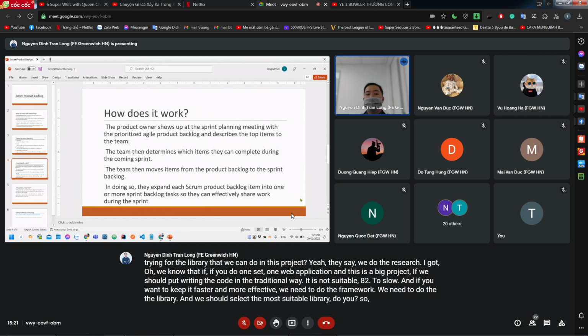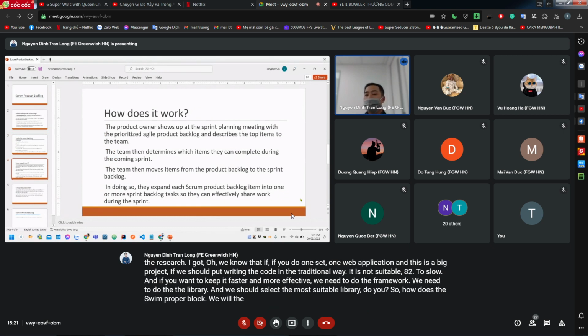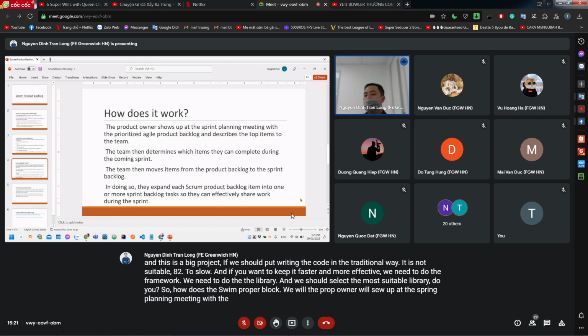So how does the Scrum backlog work? The product owner will show up at the sprint planning meeting with the prioritized Agile backlog and describe the top items to the team.